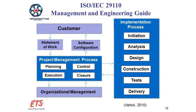The Engineering and Management Guide has two processes: a project management process and an engineering process. A customer comes in by giving a statement of work to a project manager. The project manager will prepare a plan, and the plan will be used by a team of software engineers or developers who develop the product. Eventually the product is handed over to the project manager, who then hands it over to the customer.